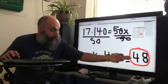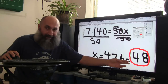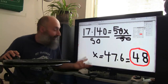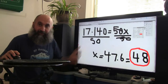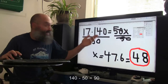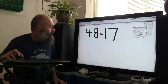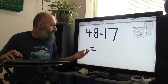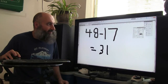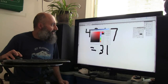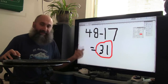Based on my original estimate of two to three months to do the videos, I'm ahead of schedule. I need to subtract 17 from 48 to figure out how many days I have left — which is 31 days. So I have another month of video editing to do, and that's ahead of my schedule. I'm doing this in less than two months.